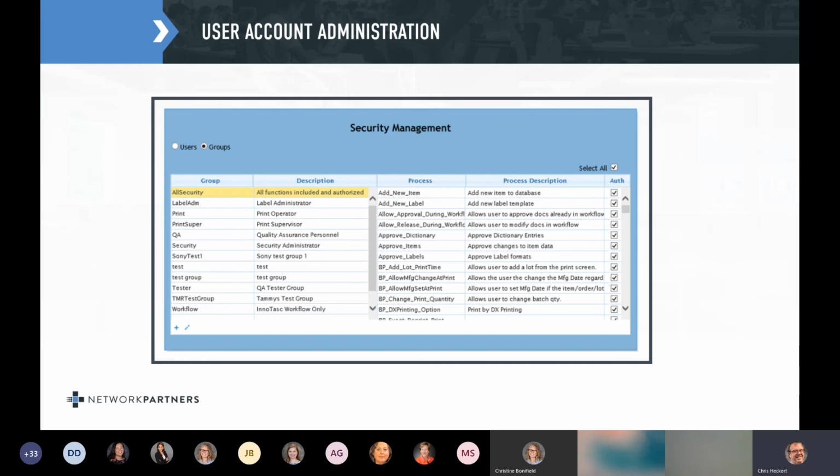I will say this, if you're on the fence on how detailed to make this URS, I suggest going toward more detail for two reasons. First, if a use case shows up that you hadn't anticipated, but it turns out that the system has the capability to address it, your quality group may require a revalidation to keep the system in a validated state. That will mean a revision to the URS, regression testing, and then an amendment to the PQ protocol. It will turn out to be more trouble to do it later than it would to do it up front.